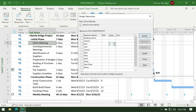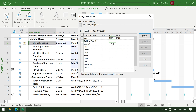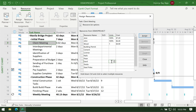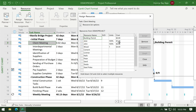You will have a list of all the resources that we entered before. You then identify how many to use. So we're going to allocate Jane — 1 unit, meaning 100%. Let's say Jane would be responsible for the entire project and maybe John is also helping out. For some reason, we're also going to use some wood to demonstrate something, and we have a building permit to assign later. Then we click Assign. We have now assigned the resources using the right-click method.